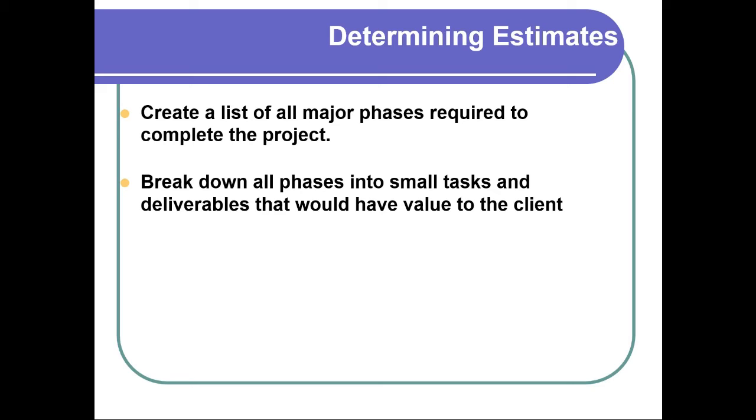Now, if you're doing, for example, personas, because maybe you're doing design thinking, then you would charge them for the persona, right? The data collection on the persona, the creation of the life and times of that person, validating the persona. So whatever it happens to be, those are the phases that you would have. Then what you're going to do is assign a time and price to each deliverable.